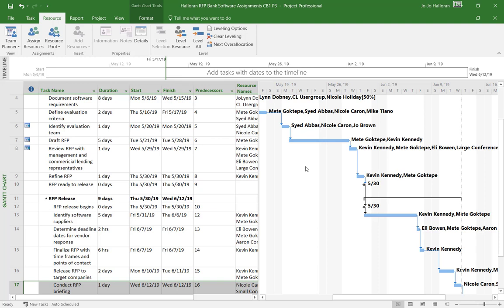and or maybe they had to cut some people back on certain days to work on other tasks. So what we're doing here is we are just going to assign other people to the tasks, and so we may reduce work hours but keep the same durations, or we might increase the amount of work but keep the same durations, or our other option is reduce the hours resources work per day but keep the same duration and work. So we're going to select task 4.